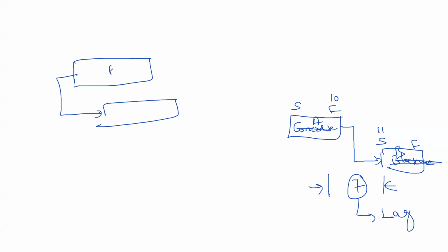By the way, here you are seeing a finish to start relationship with lag. Lag can be with other relationships as well. For example, these numbers are indicative, it could be 7 days, 5 days, 10 days, 12 days, depends on the relationship. If you are saying 2 days after the start of A, you can start with B, what is the relationship between A and B? Start to start, but there is a waiting period of 2 days. So it's a start to start with a lag of 2 days. This is finish to start with a lag. This is start to start with a lag.